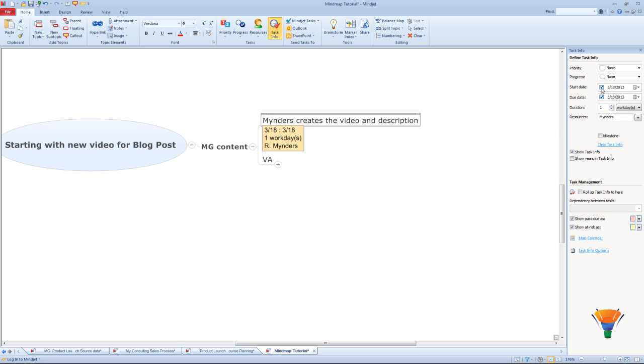And I can even put today's date, if we'll assume that it's the 2nd of January. And then I move the due date back to the 4th. So I've now allowed myself 3 work days to create the video and the description.